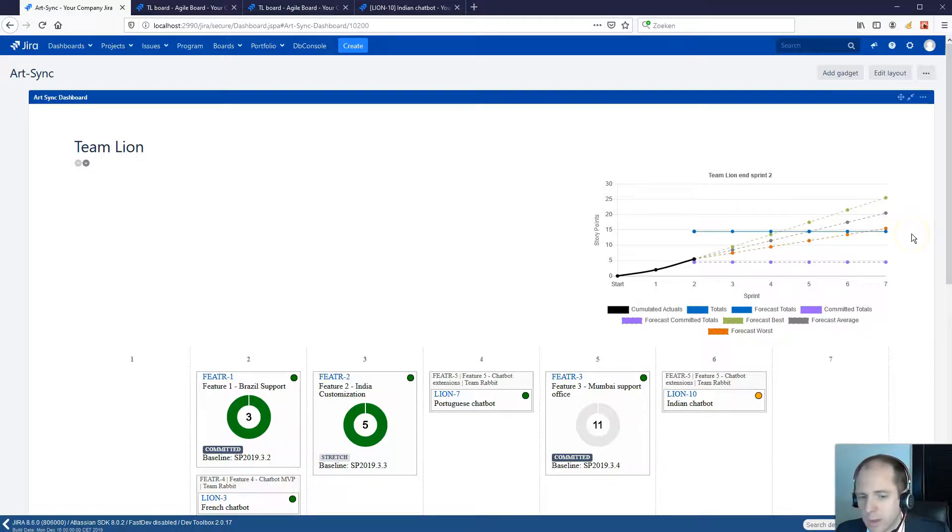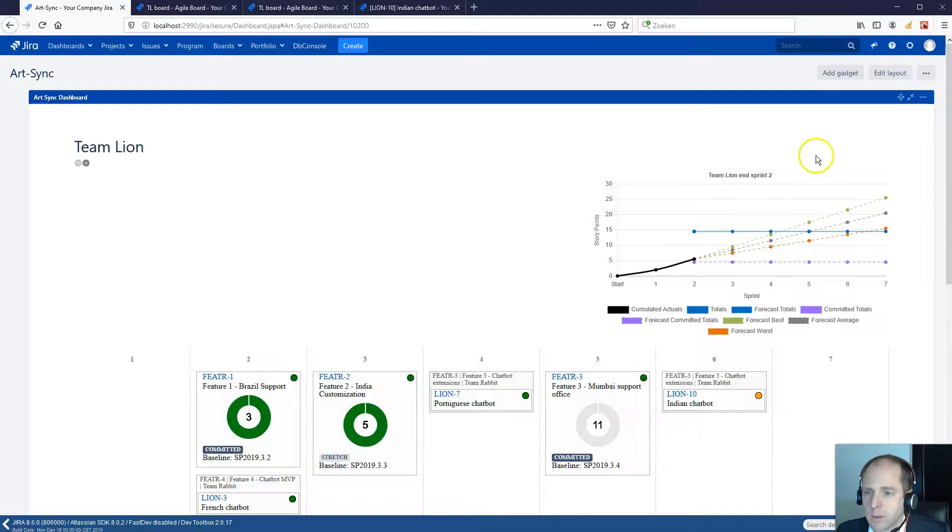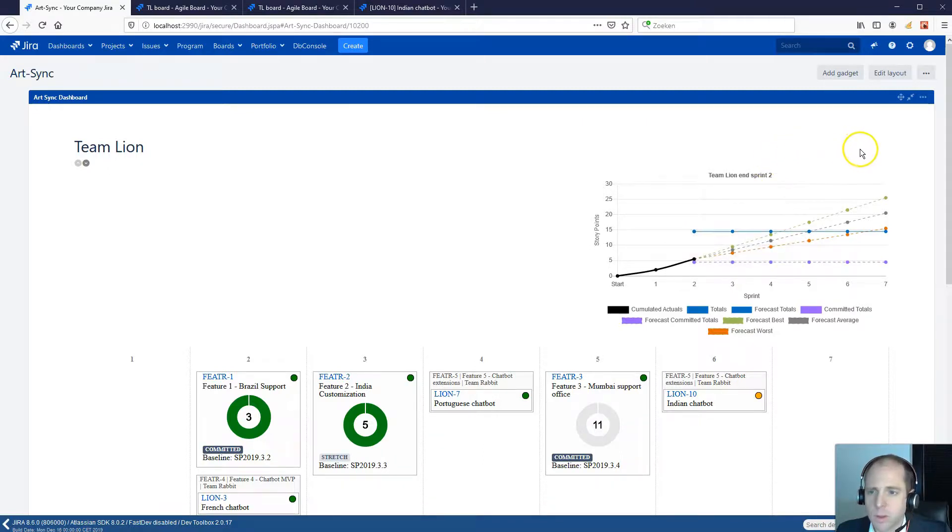So in this case, the team is on track because the optimistic plan is at sprint 4 and the pessimistic is somewhere mid sprint 6.